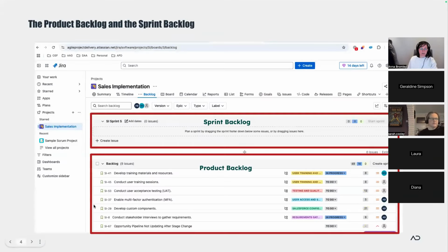So, product backlog, let me move on. I'm going to go into Jira in a second, but in case anyone hasn't seen it before, let me just spell it out. Generally, there's a backlog that looks like this, and you've got different issue types here, and you group them into general epics. And then you've got a status, some story points, priority, and then an assignee. So that's all a product backlog is.